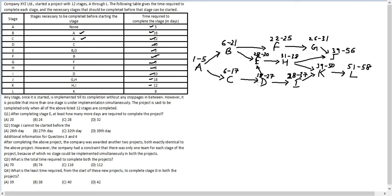This is the entire project. Any stage, once started, is implemented through to completion without any stoppages. However, more than one stage can be under implementation simultaneously. The project is complete when all 12 stages are completed. These are standard network diagram conditions, so we could arrive at our diagram even before reading the instructions.